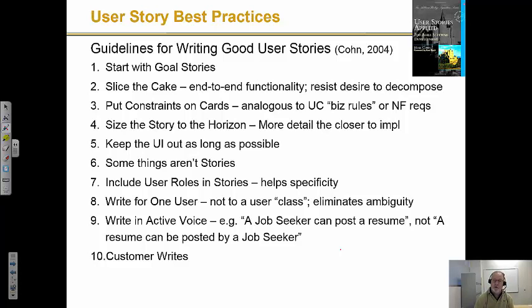Realize that some things aren't stories. A lot of Agilists will, I mean, there's a number of mechanisms, and I'll talk about some of them during this semester, for expressing things that aren't really conversations with the customer, but getting them on your Scrum board so that you can track the work with one tool. That's really the motivation for that. So maybe you do have some setup, some infrastructure work, some research work to do. And the dev team really needs that done, but can't really associate it with a specific story. So you can create something called a zero value story. There's no business value to it, but the team has to do it as part of ramp up. That's an example of what I mean.